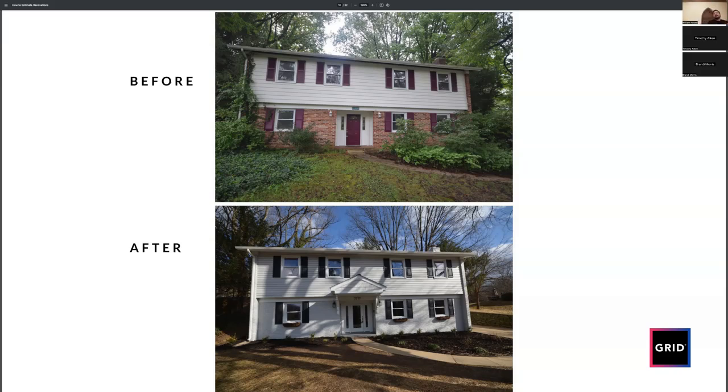And I already know this laminate is $1.50 a square foot, and this is a, you know, 200 square foot room. I can figure out what my floor is going to cost me because my contractor told me, hey, I'll charge you $2 a square foot to install, right? These are conversations you have with your contractor.